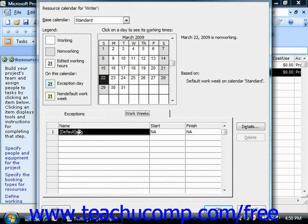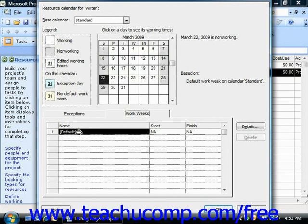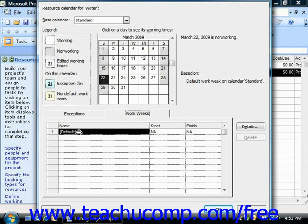If you wish to change the default work schedule for this resource for all weeks in the project, you can select the default row on this tab first. If you only want to set a work schedule for a specified range of time, then click into the next blank row instead. You would then enter a name for the range of time into the Name column, and use the Start and Finish columns' dropdown arrows to set the start and end dates for the work schedule. The work schedule you create will only be used during the dates selected; during dates that don't fall within this time, the default schedule is used.